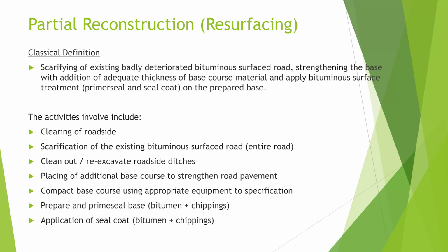Now, by classical definition, partial reconstruction is just scarifying the existing badly deteriorated bituminous surface road, and then you strengthen the base with addition of adequate thickness of base course material, and then you apply the bituminous surface treatment. And here we are using a Prima seal and seal on the prepared base. So resurfacing is purely you scarify, strengthen the base, and apply Prima seal and seal.